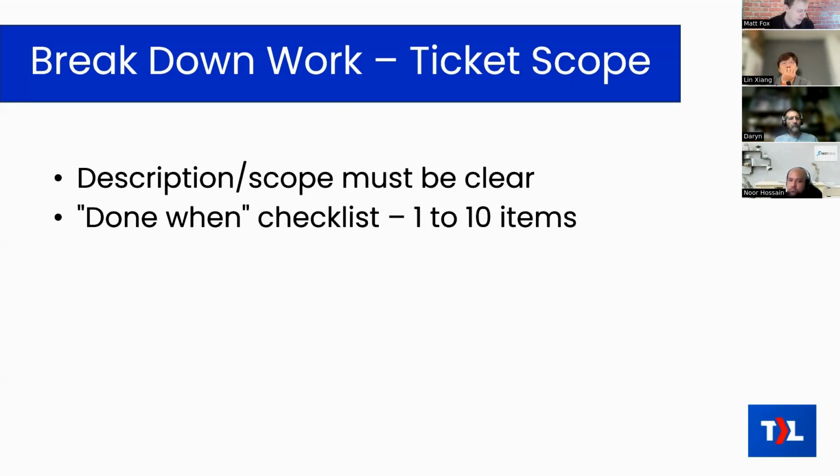And that can also be actually using the checklist functionality in the tickets in ConnectWise or Autotask. And the level of detail of those points can vary, because if you're going to have a more senior person doing this work, then maybe you can just write the outcomes. You don't have to lay out all the details of how to do this. And if a more junior person is probably going to do this work, then maybe you do have to lay it out, not just the outcomes, but the specific things to do. So how you write this still depends on who might be doing the work.